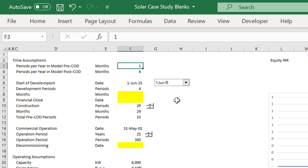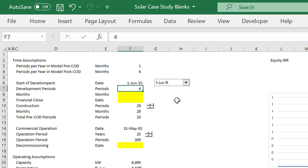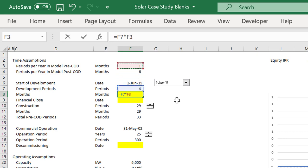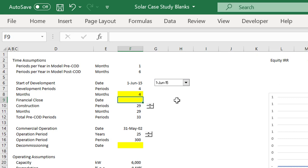COD stands for Commercial Operation Date - it's when the project begins, the key date where everything changes. Before COD and after COD is like a gigantic change in your life. You start with development, then construction - that's the risky part, like a dating period. You go on all these dates spending money and the chances of anything working can be very low.